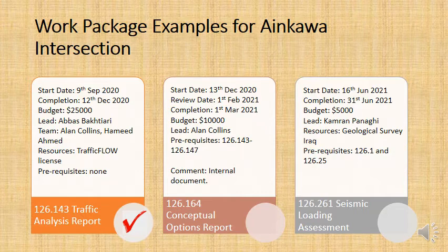There's also seismic loading assessment. That's another work package. Who's going to do that? Well, of course, it will be our resident geotechnical engineering expert, Dr. Kamran Pinari. And the resources that he needs are the Geological Survey of Iraq, certain prerequisites 126.1 through to 126.25. Those need to be achieved before he can begin this work package. He's got a budget and he's also got a schedule for achieving that.